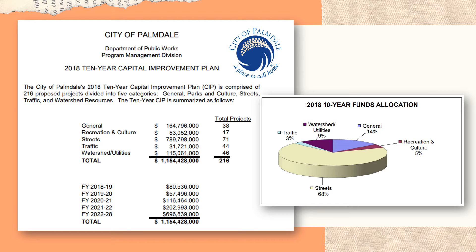The comments and input are incorporated into a new CIP document, which is presented to the planning commission for the determination of whether it's consistent with the general plan goals and policies of the city. Early planning activities of a CIP project, such as building assessment, needs assessment, and even master planning, are often funded out of general revenues.